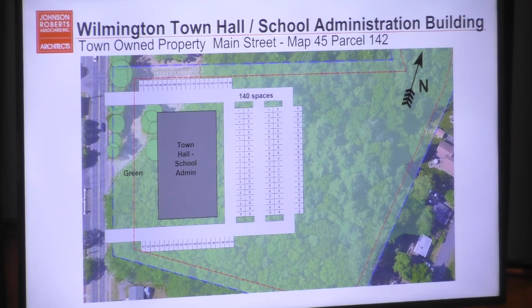No, but I would think between now and the 5th, it would also be appropriate for Phil to talk to Ken and maybe understand where he's going. That's a big program change, to add 5,000 to 6,000 square feet. It's going to be $500 or $600 a foot. That's a lot of money for a TV studio.